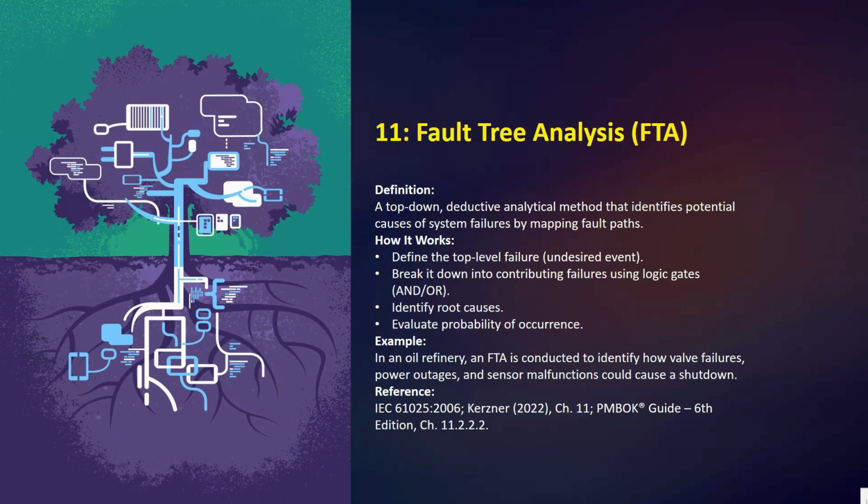Okay, so under the fault tree analysis technique, you start with the undesirable event, which you place at the top of the tree, and then you work down identifying all the potential combinations of failures or circumstances that could lead to that event. So it's a visual way to logically trace the path to the problems.